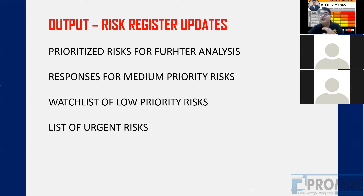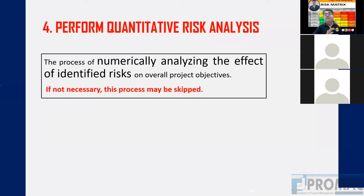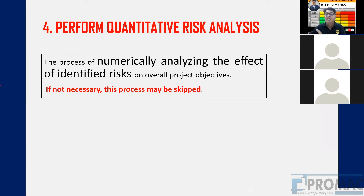We do not perform numerical analysis for every risk — only for high-priority risks. For medium-priority risks we find responses, and low-priority risks go on the watch list. In quantitative analysis, we calculate EMV — probability multiplied by impact — and use this to correct the cost baseline and schedule baseline. This process may be skipped if not necessary; after qualitative analysis we can move directly to risk responses.